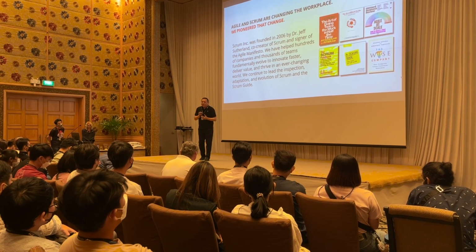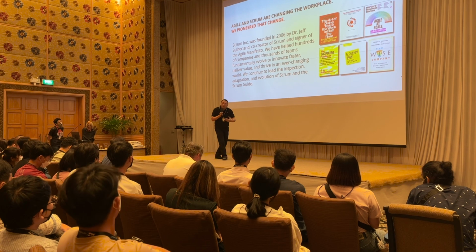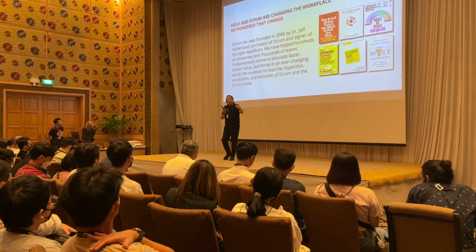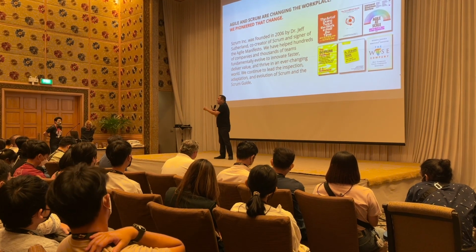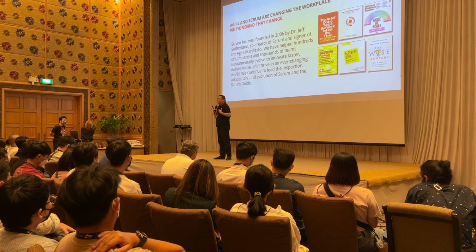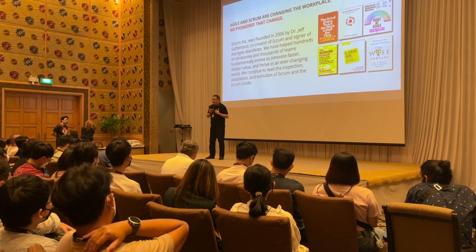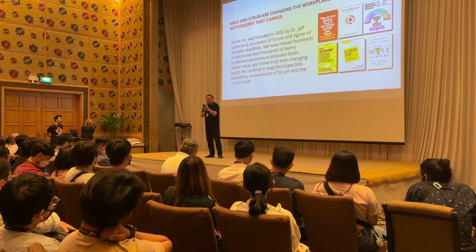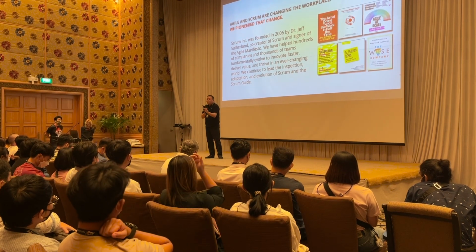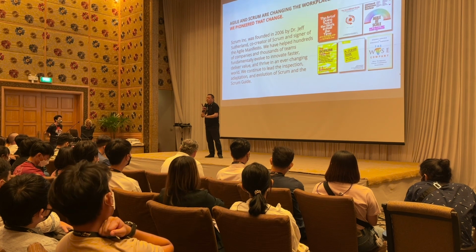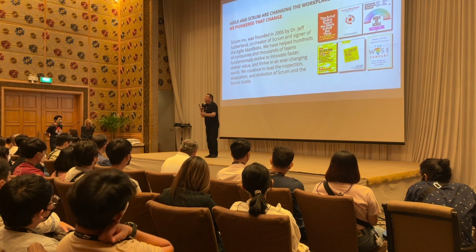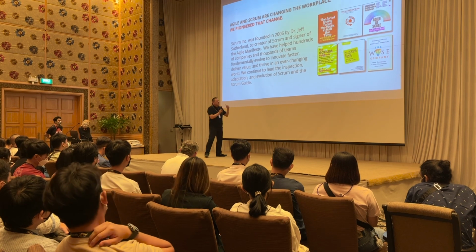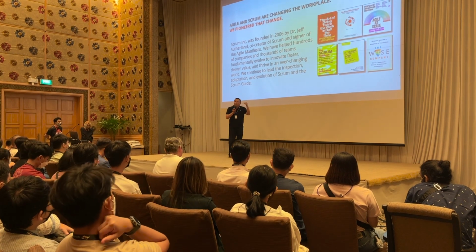Why is it 4.6? Because as Jeff traveled around the world, he looked at the best performing teams, right? And then he told us, the Scrum@Scale trainers, that okay, from what I've gotten, the 4.6 number is the best number for a Scrum team. That means 4 to 5 people. So as you are able to configure 3 to 9, your best configuration is around 4 to 5.